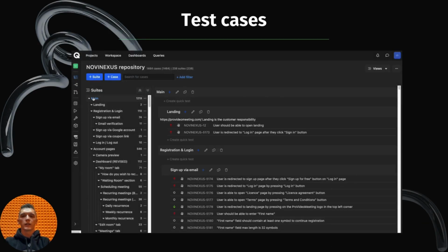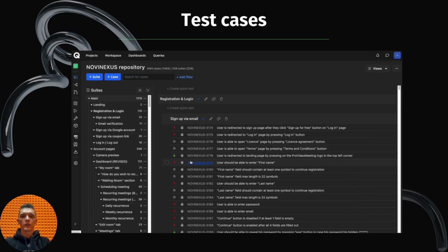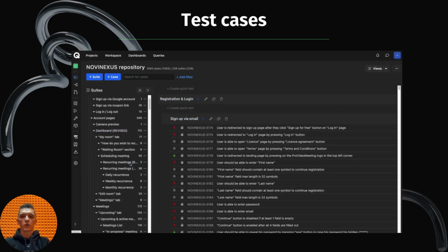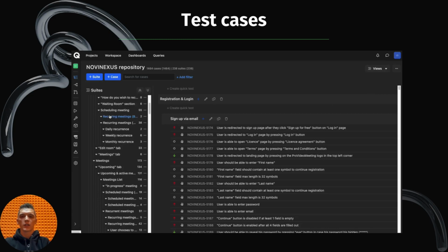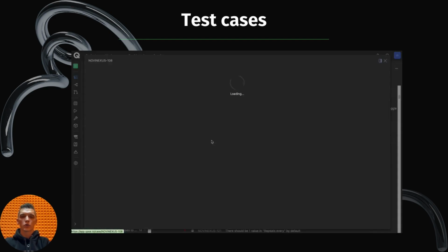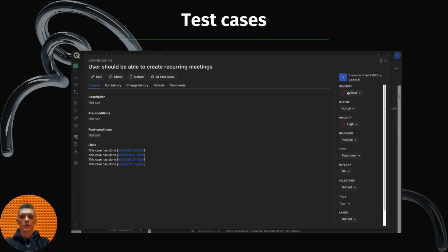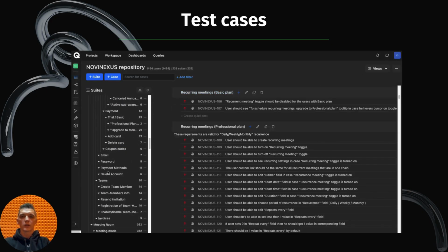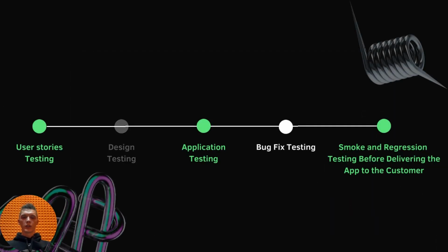Based on these criteria, the tester plans testing and prepares test documentation, test cases, and test suites. We use KSEO to manage the test cases. Our test cases cover all requirements from the user story and also take into account negative scenarios and possible edge cases. They are also supplemented and updated as the project develops. So, while our testers were making test documentation, designers had already developed mockups, and developers had time to design the architecture and started developing APIs.